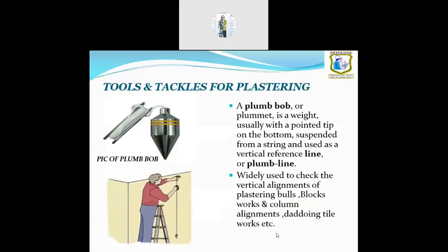Okay. A plumb bob is required during dadding of the wall areas, where you have to check the levels. Usually we start the vitrified tile dadding from the top of the false ceiling area. First we have the marking done in the wall areas perfectly and see where the cut tile is coming, because dadding is very, very important. You have to know the plumbing locations also properly. That's why we interpolate the plumbing drawing along with the architect and tell them to center the tile areas exactly to the plumbing joints.